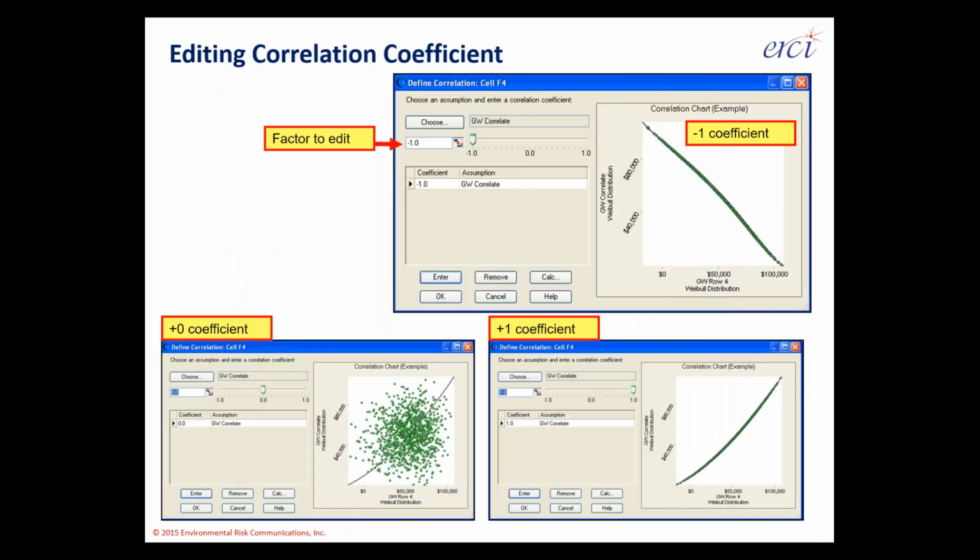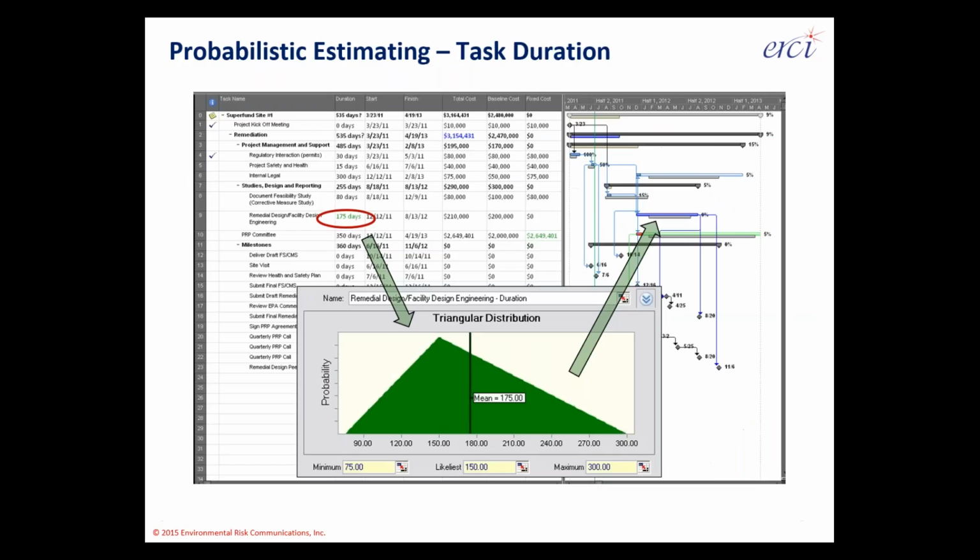The correlation process is something I describe here using older versions of the Crystal Ball software. The screen captures are again meant to convey how to do the work, but basically you're adjusting for a positive or negative correlation. Again, generally positive, generally 0.8 to 0.95 is normal for environmental liabilities in my experience.